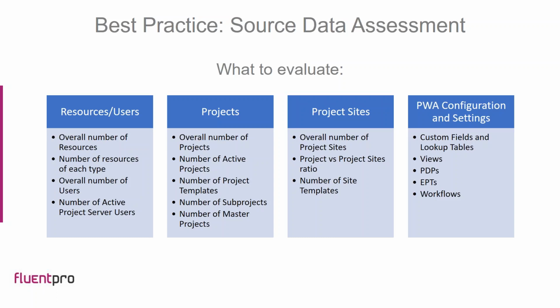Number of master projects is an important item because they are more complex than small and single projects, and depending on the number of master projects in the environment, this may take longer to perform the download and to upload the data.